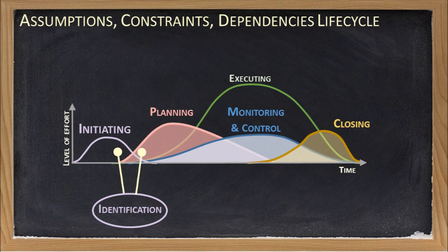A project manager should view their initial findings with some degree of skepticism and explore each one to make sure that they are indeed relevant to the project and worth incorporating into the plan. With regards to constraints, keep in mind that in general constraints are unwelcome restrictions on the project. If ways can be found to eliminate, avoid, or work around them, then doing so will result in more flexibility in the planning. Otherwise, constraints need to be accepted and incorporated into your plan.